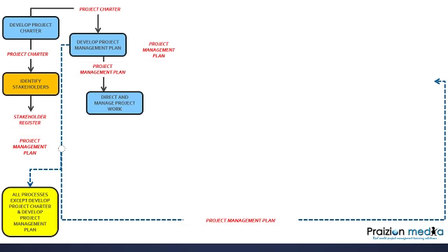All right, now the project management plan, since it goes everywhere except those two, DPC and DPMP, of course it goes to direct and manage project work. It goes to everything else I'm about to show you. But I'll just call your remembrance to these facts just so that you can know them really well and see the flow, because the project management plan needs to be acted upon, and it's by acting on the project management plan that we get our work performance data, right? We're carrying out the plan.